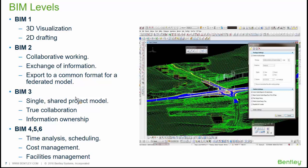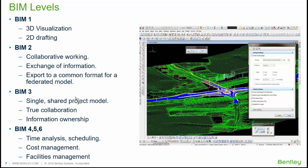After that, into the model we can incorporate time analysis and construction scheduling — that's BIM 4D. BIM 5D is when we apply cost management to that same project. BIM 6D is when we apply facilities management. The bridge is already built, and then we need to establish the inspection and maintenance operations, using the same model and adding at every single step of the lifecycle more and more information into that model.